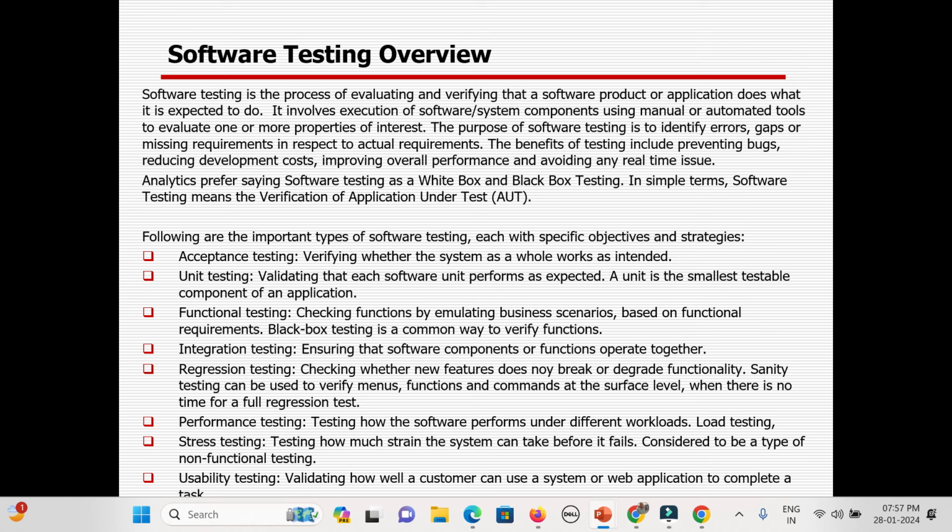Because the development team used to take a lot of time, sometimes they delayed things and it would affect the testing team, so product quality was not up to date because of the long tenure, and sometimes it was a big failure. That is the reason the methodology changed, called agile, where instead of taking 1 year to develop and 6 months to test, they divide the life cycle of 1 or 2 years into different sprints. One sprint can have 2 weeks, 3 weeks, 4 weeks, like that.